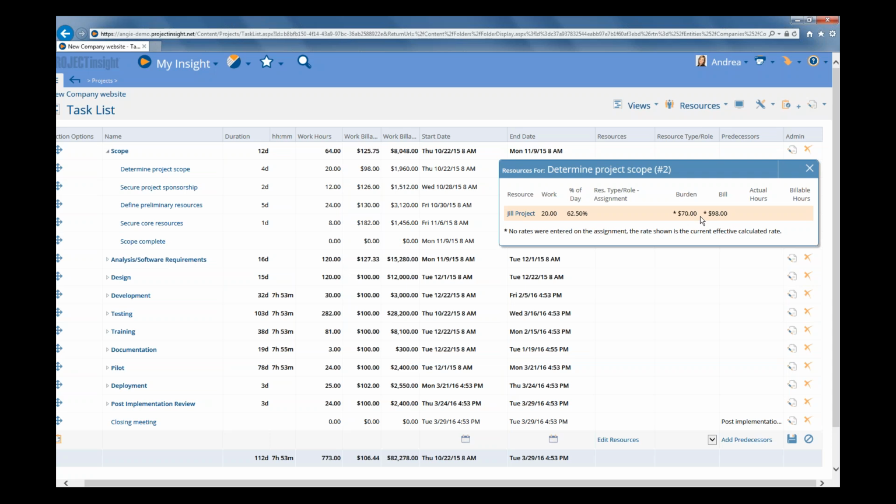You just pay your user a salary or set cost per hour, and you calculate their fully loaded cost or burden rate, which includes the overhead costs, and that doesn't change unless, of course, they get a raise. Now, it's very important that you ensure that you have your billing rates and even your costing rates set correctly before you allow your team member to enter time. So time entries get stamped with the rates as they were applicable at the time those time entries were made. So even if you later change what contract was applied, it's not going to change those previously entered time entries, so that's important to note.